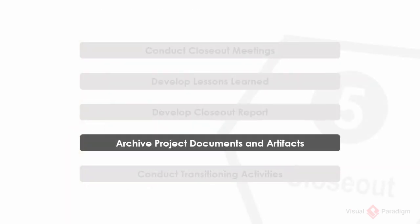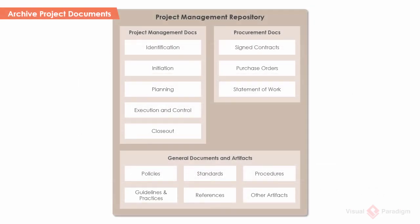Archive project documents and artifacts. The project manager has to work with other project participants in storing all project documents and artifacts for future use or references. He also needs to ensure that all necessary approvals and signatures are present, and that required final versions of documents are archived in auditable form in an agreed-upon place and cannot be edited.